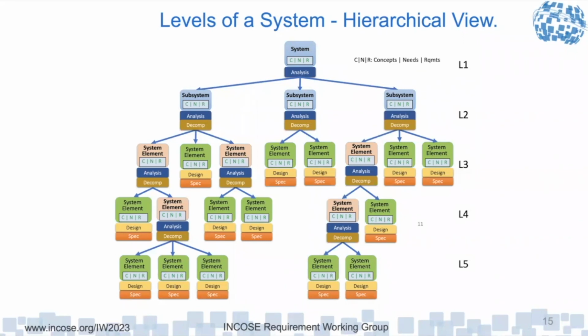And the other important thing about it too is that in a project, there may well be different contractors. So the facilities, for example, have to be separated out to be the facility shall, because they're going to go off into a facilities contract, whereas the end product might go off to an end product contract, but the training might not. There might be a separate engagement for the development of a training needs analysis, and the training pack, and then the conduct of the training. So by being very clear about the entity and making sure that it's appropriate to the entity, it's not just the level for me, it's also how the project manager is going to contract, how many contracts are needed, all in one or whatever.